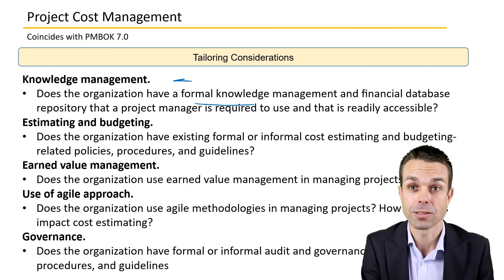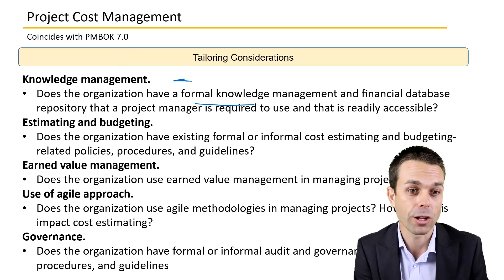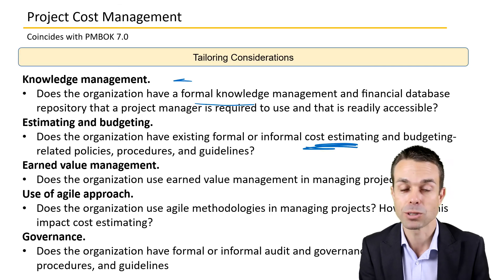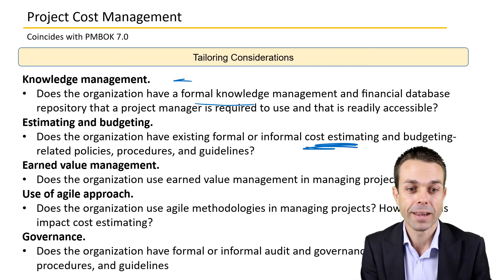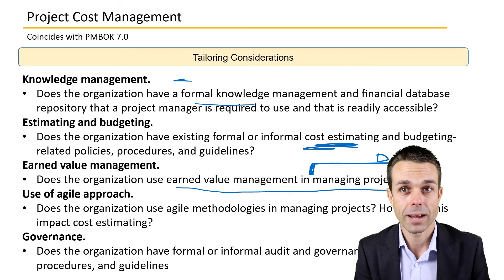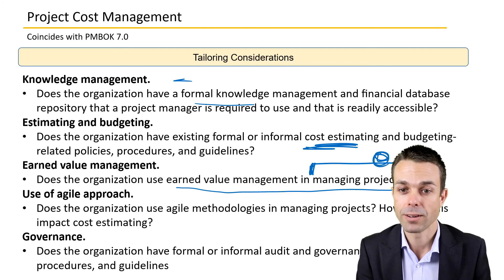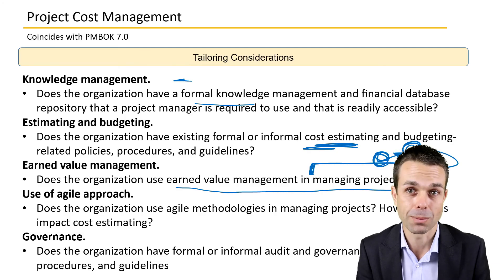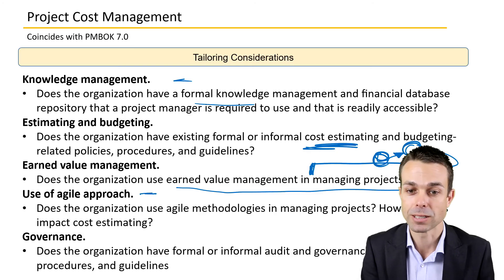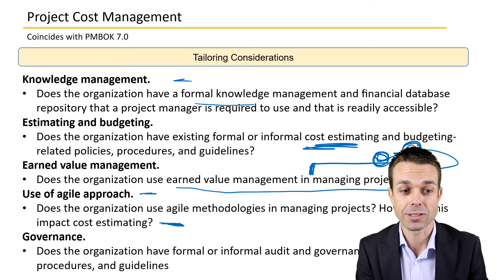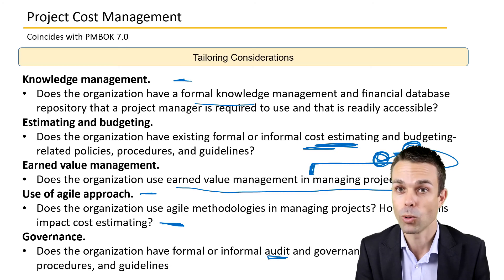Tailoring considerations for project cost management include: knowledge management — does the organization have formal knowledge management or do you need to create something yourself? Estimating and budgeting — does the organization have existing formal or informal cost estimating policies, procedures, or guidelines? Earned value management — does the organization use EVM, or do you need to apply it for your specific project? You'll need to know if your budget is going off track. Also consider agile approaches and how lightweight estimating techniques impact cost, plus any formal or informal audit and governance policies.